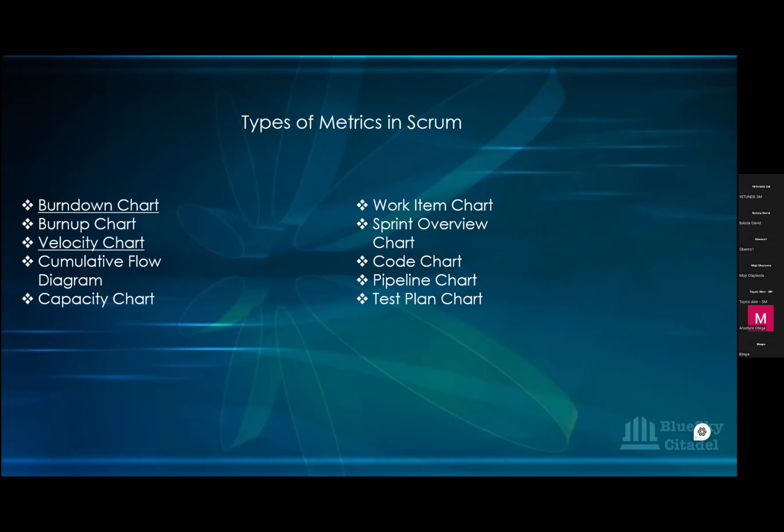And then they are able to share any challenges they're facing with you. Oh, we're not getting content on time from the business or from the client, from the stakeholders. We needed them to give us content. We needed them to send pictures to us. They wanted this number of pictures on their photo gallery. The PO has been on their case, and they're not sending those pictures to us on time, and that's why we don't have the stories ready on time. And there are times when stories are dependent.